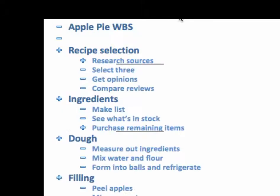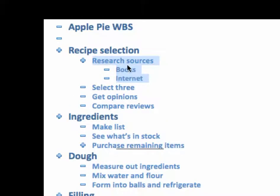I'll break this into level two, and I broke this down into another level. So in recipe selection, I have to research the sources, select three recipes I want to use, get some opinions and compare reviews, and finally make a selection. I could break down researching sources even further — for instance, books versus the internet.